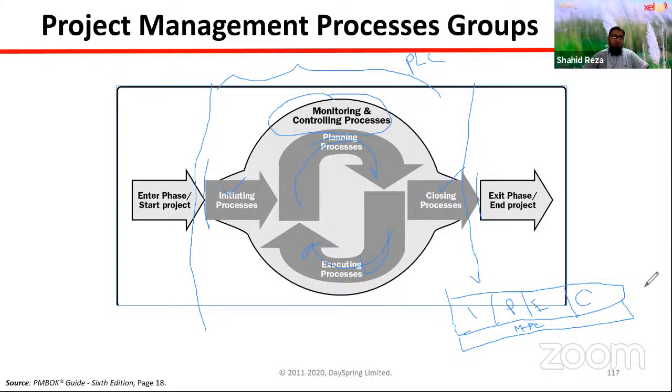That is the pre-project phase, and there are some activities that are discussed in PMBOK. Mainly, we produce 2 documents at that stage. This is the general picture, not following government rules or other things. One thing is the business case. In the private sector, everywhere, when we initiate a project, before that we have to create a business case. Business case means justification of the project. Right. Why we should do this project. That justification is written in the business case. So that document is known as the business case, and another document is known as the benefit review plan.